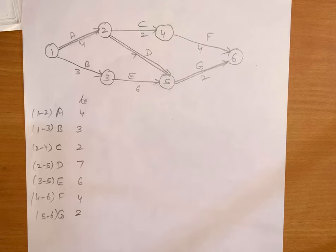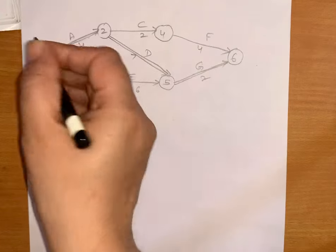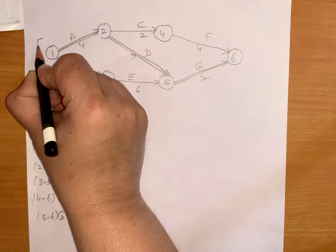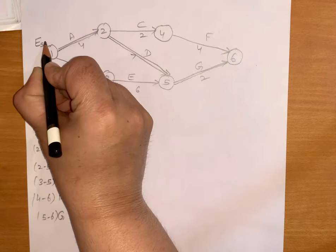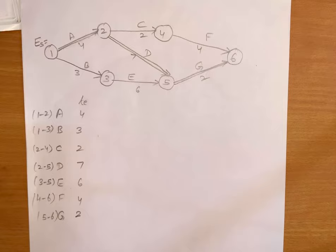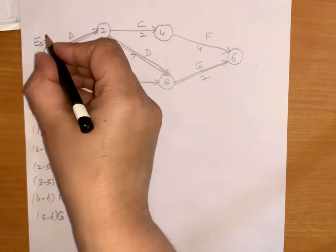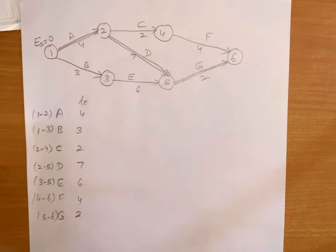Again I am taking the same illustration, example 13. Now today we will learn how to find out earliest start time. Earliest start time is denoted by ES, and for the initial event, earliest start is 0. So earliest start time for the first event is 0. Now we are to calculate earliest start time for each event.